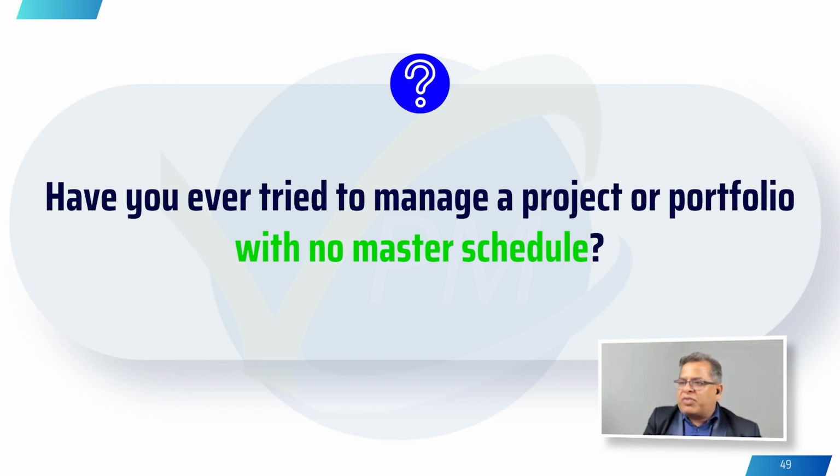Anyway, I was delayed only 5 days, and there's a lot of story around that. I will talk about it generally in my program, but a lot of miracles happened, many things happened at the time, so I reached there. But I don't advise this. If you have to do something like this, make sure you have highlighted this as a risk to your managers and document it, because sometimes in the future they can come back and ask, hey, why did you miss the date? Why did you do this? What about the budget? Yes, in one way they're asking you to do a favor. At the same time, there can be some challenges for you as well. So be careful.